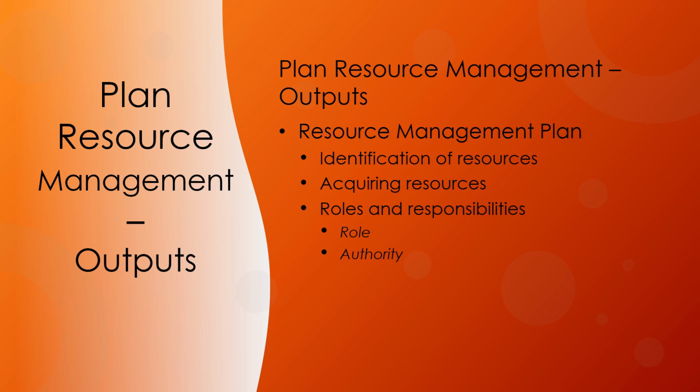Examples of decisions that need clear authority include the selection of a method for completing an activity, quality acceptance criteria, and how to respond to project variances. Team members operate best when their individual levels of authority match their individual responsibilities. Responsibility are the assigned duties and work that a project team member is expected to perform in order to complete the project's activities.